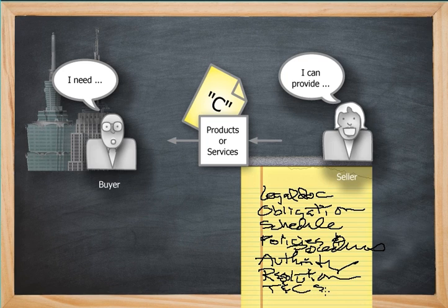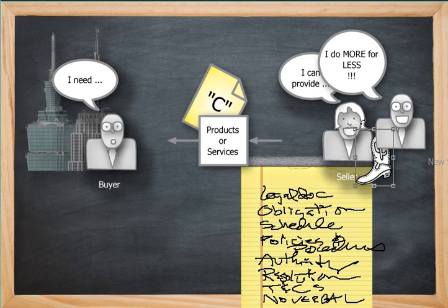And here's an example. Royalty payments will be expected at $1 per copy for the software for a period of 5 years following delivery. And finally, no oral or verbal agreements. This is where an agreement is written and approved by both parties before work commences. A handshake agreement is setting both parties up for a big letdown, and commencing work before the agreement has been signed will more than likely put the seller at risk, just in case business terms collapse, or another competitive seller, in other words, the buyer's owner's son-in-law's business, comes into play. And let's show that graphically. Here comes the new seller.